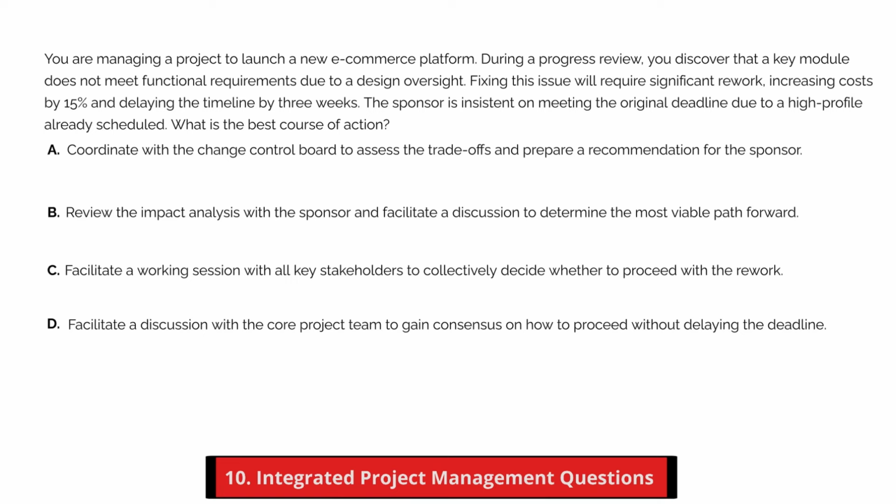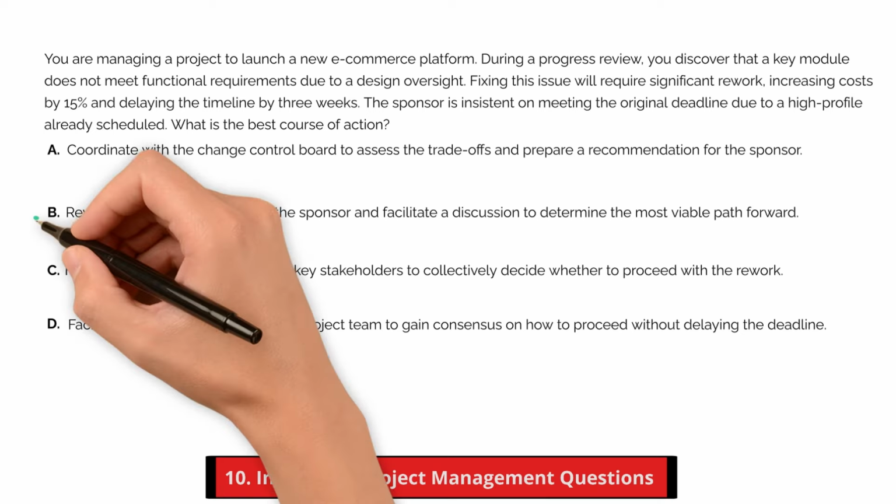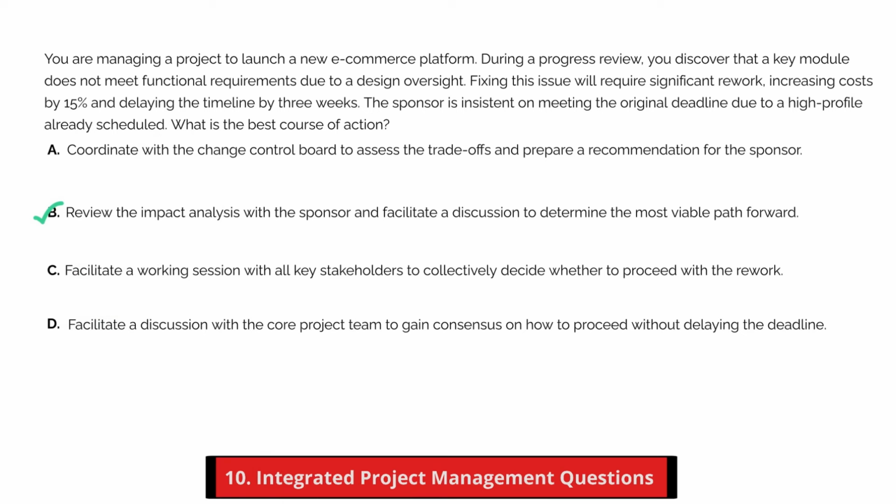All right, let's break this one down. The best answer is B. This is an integration and stakeholder engagement scenario. PMI expects the project manager to present the impact and engage directly with the sponsor, who is accountable for making trade-offs involving cost, time, and scope. The sponsor must be included in the decision-making process, not bypassed or substituted, since the outcome directly affects business value and public commitments. Let's look at why the other choices are wrong.